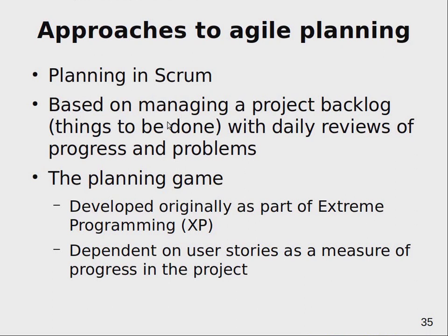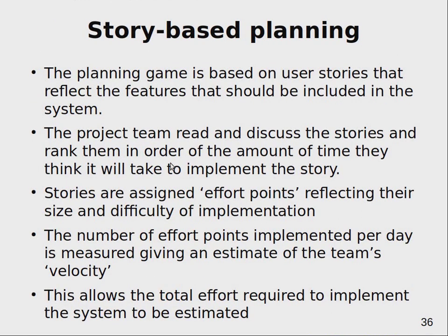And so common way how to do it is Scrum projects, and I already told you about this and how you do this. And also particularly for Scrum, if you describe everything as a user story, then you should have a pool of stories to be implemented, and you take out some of these stories for a particular sprint which you think you will be able to deliver in a particular scope of time, like 1 week, 2 weeks, 3 weeks, 4 weeks, something like this.